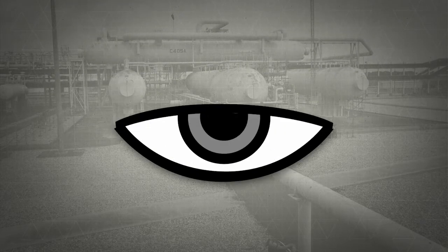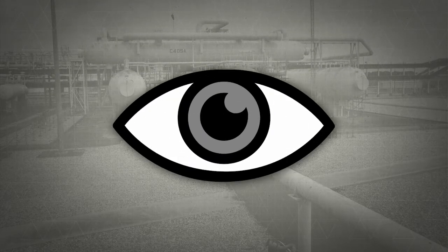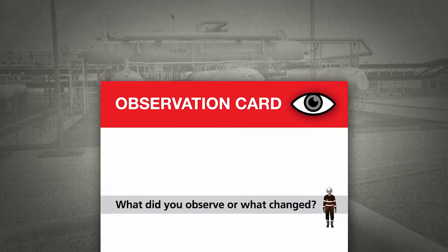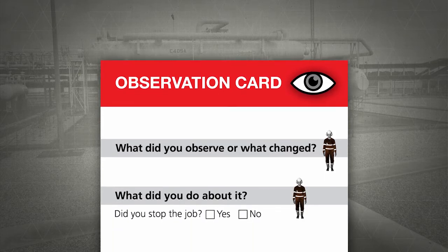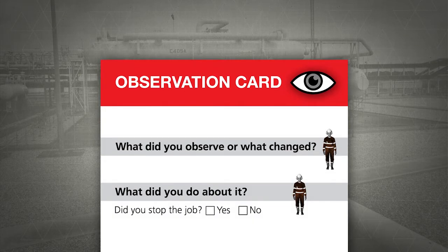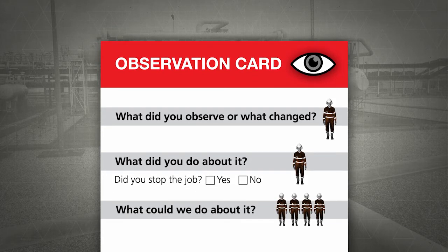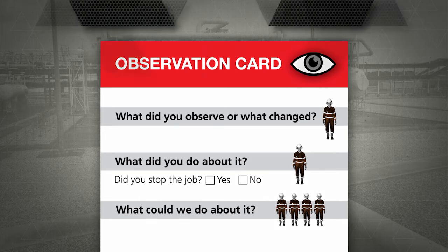Job done. Or is it? An after-action review is a structured way of looking at what was planned against what happened during the task. By following the same open-ended questioning structure as we do in the Toolbox Talk form, the what, the why, the who, the where, the how, and the when, we are able to review what worked well and what could have been planned and executed better. Shared learnings keep us safe at both an individual, team, and organisational level. That's why we take time to record our findings. It helps recognise trends and gives us a platform for feedback and positive change.